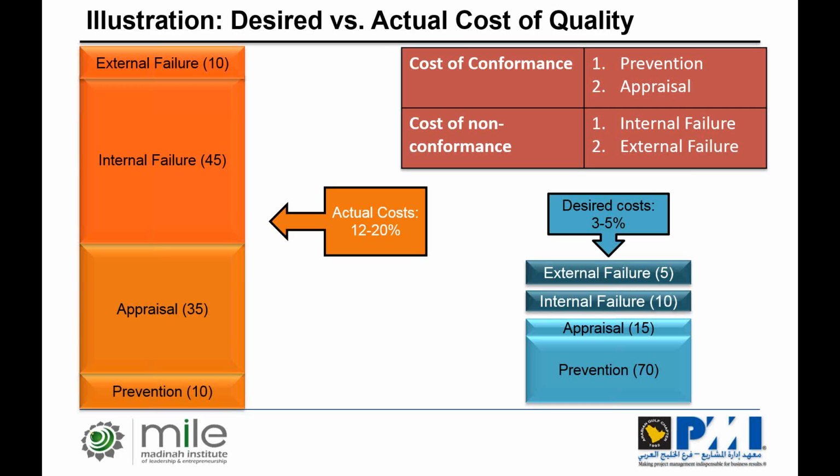And I've done projects with organizations that they have forms that they are submitted and then they're approved by 8 layers of approval, and each layer may actually throw the entire form out, and then you have to restart. And I found it to be a waste, right? Because we have so much duplication of effort. So my goal is to measure how much I spend on quality, check where it's spent, because it's most likely not spent in the right places. You see too much appraisal, too much failure, and how I manage to reduce it. So if there are indicators, these are the 2 main indicators. They are tied closely to quality, but essentially it's an indication on whether we are putting stuff together properly or not.